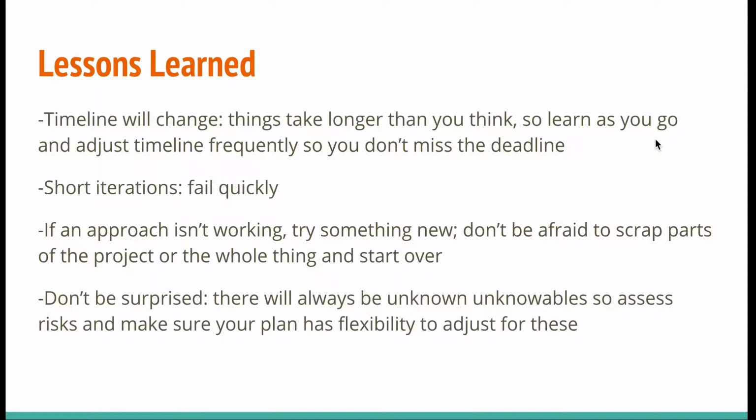It was impossible to organize it like that. It took me two weeks to learn something that I should have just tried really quick in a day or two. And if it wasn't working, give up and try something else, or learn quickly.